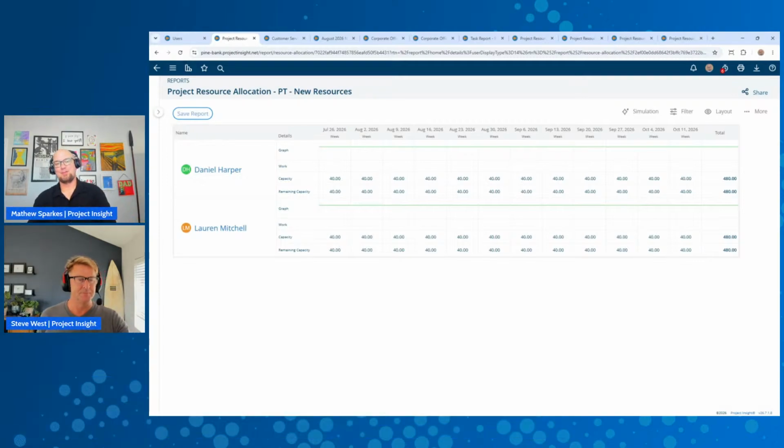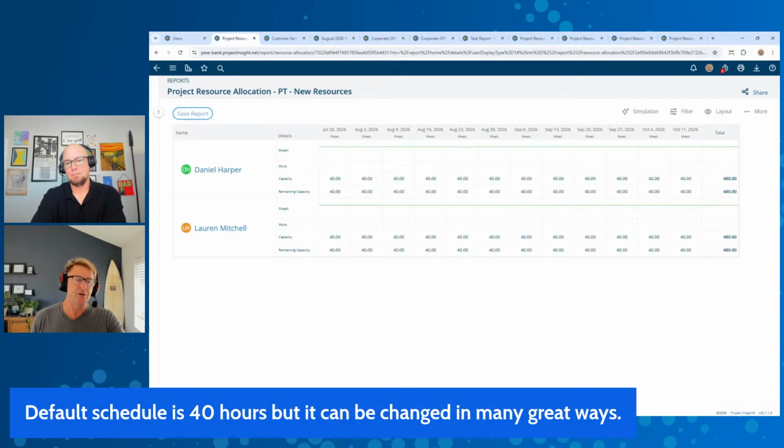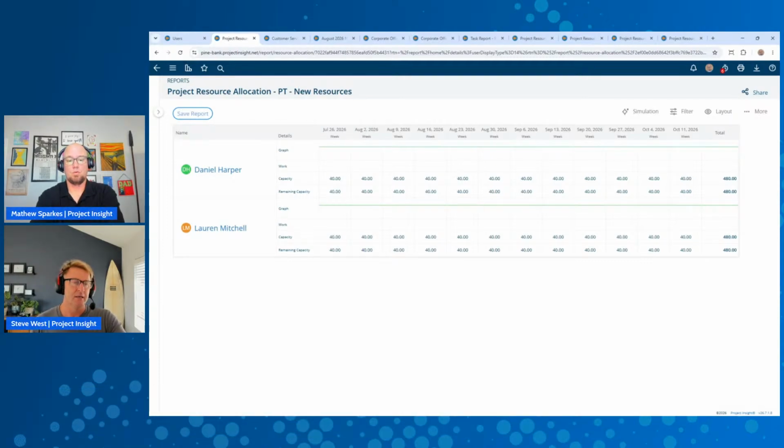I think that's a really strong call out there, Steve. Everybody can be on their own work schedule. And you can also specify when they're beginning. Some of our clients have people starting in September, so you want them in the tool now because you're planning, but you don't want their capacity to start until a certain date. So you can specify when their capacity begins and when their capacity ends, as well as tailor the actual capacity number. We're just starting here, to keep it simple for this demo, with a 40-hour standard work week. That's what it does out of the box.